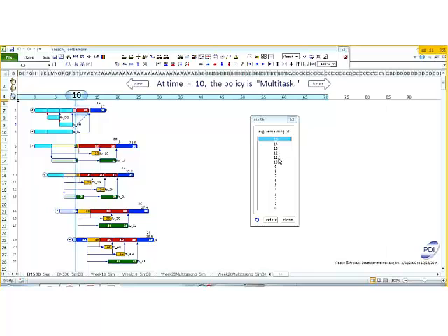So let's see, it doesn't look like this is quite ready to start. We've still only got one active task for the red, so we've got to go 5 days here. Yellow, we've got 2 active tasks, so we can go 5 and 5. Oh no, we can only go 3 and 7. I don't think we can start this yet. Yeah, we'll go 3 and 7. I've got 3 more units of output I can apply, but there's no active task I can apply it to, so we lose some capacity because of the handoff delays.